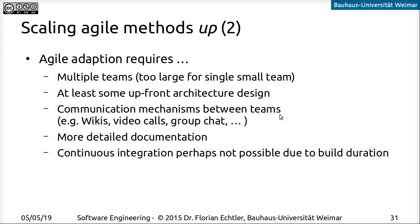Teams also need to communicate. If they're in the same building, you can have something like a weekly meeting between the Scrum masters. For distributed teams, you need to use group chats like Slack, regular Skype calls, or a wiki to communicate and create documentation — a wiki is a good idea where everybody keeps their notes and others can look them up. For really large systems, it might not be possible to do continuous integration all the time, since the build time may simply be too long.